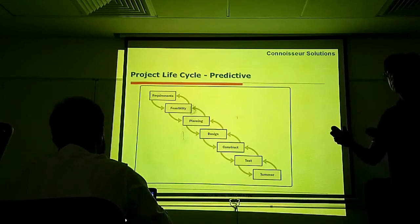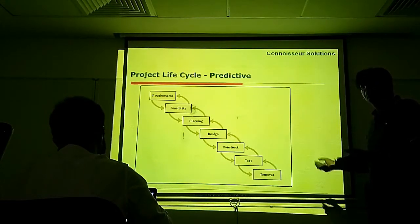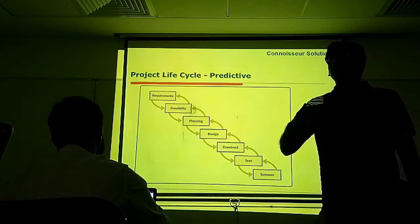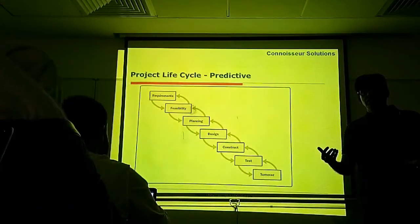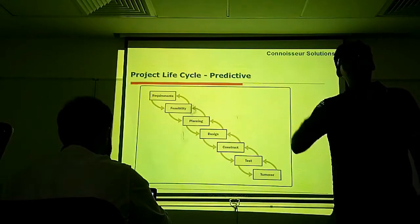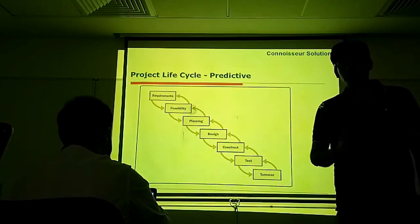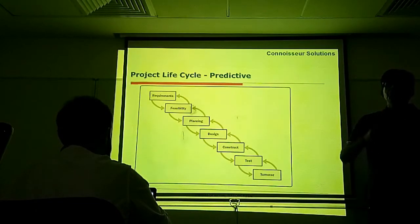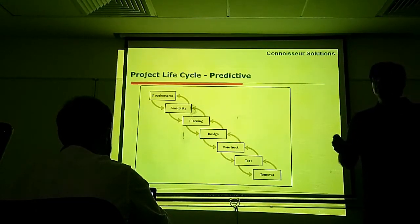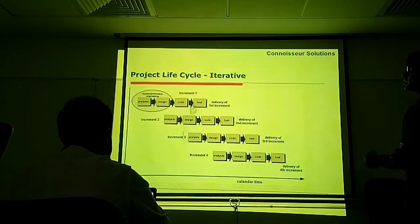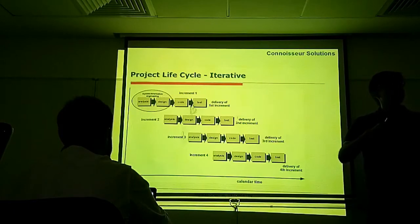And when he sees the product at this point, so late in the project life cycle, he may not be happy with the product. So what happens? He might outrightly reject the project or he might recommend some major changes to the product or project. To avoid this, bigger projects are generally delivered incrementally in a phased manner. So this is iterative life cycle.